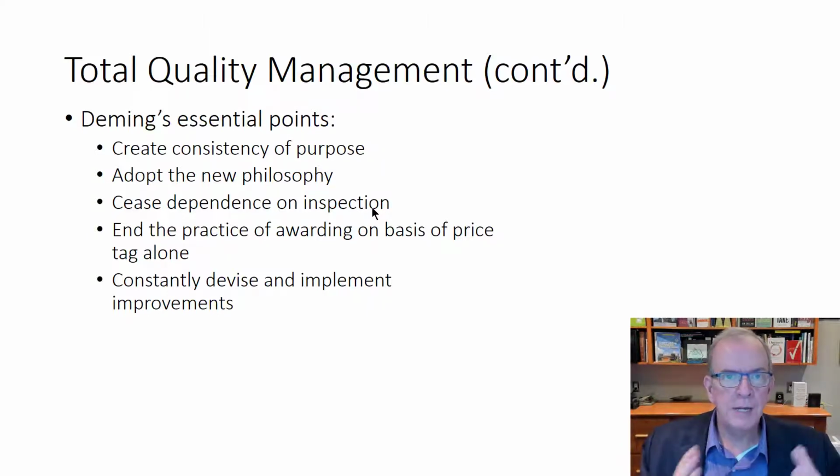So if I'm a painter, much better in a lot of ways is the painter happy with the taping, because the painter is the one that's got to do minor touch-ups and things like that. Does the painter find that the taper did a good job? That's even more important than you as a site manager saying it's good. So does your painter say this is really good? So that's sort of setting the standard for quality for what is acceptable.